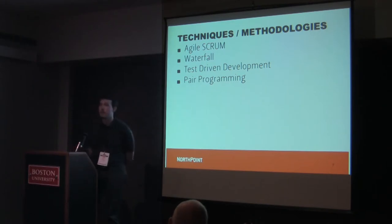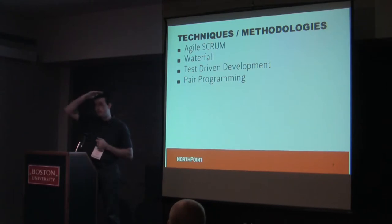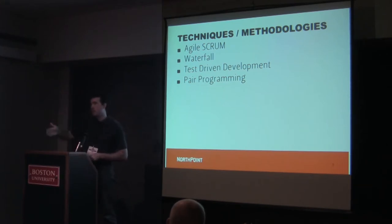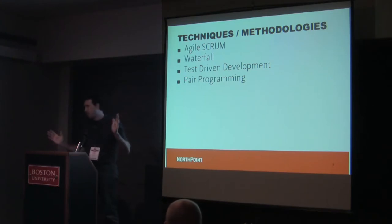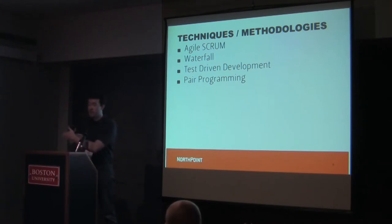Waterfall, visually, is exactly what it sounds like. Everything has to be complete before it comes down to the next phase. First you do requirements gathering, then you can't start wireframing until requirements are done, can't start visual design until UI is done, can't start development until visual design is done. Traditional Waterfall was never really adopted well in web development because everything always crossed over — you always started design before wireframes, development before designs — and that's still the case today.